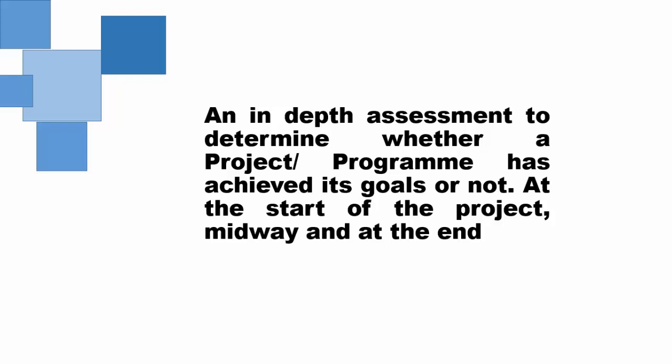Now, I want to re-emphasize this point that this evaluation is so important. And in the next slide, I'm going to talk about this. But I also want you to remember that you can actually do it. Most people you talk to will tell you that they believe that the evaluation should be done at the end of the project. But actually, the evaluation can be done at the beginning, midway, and at the end. And this is because when you do it at the beginning, you're actually establishing some kind of a baseline, so that when you do the evaluation at the end of the project, you can be able to determine whether any change has been achieved or not.